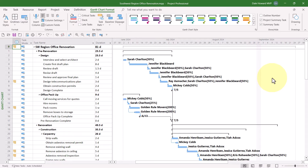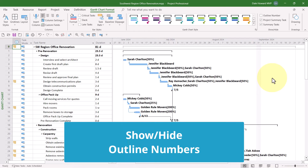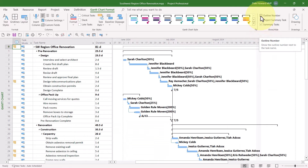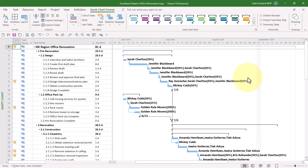At some point, you might want to display the outline numbers for every task in your project. To do this, all you need to do is select the checkbox called Outline Number. Notice how Microsoft Project calculates the outline number for each task in the project.